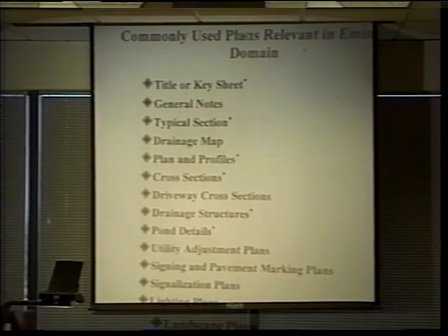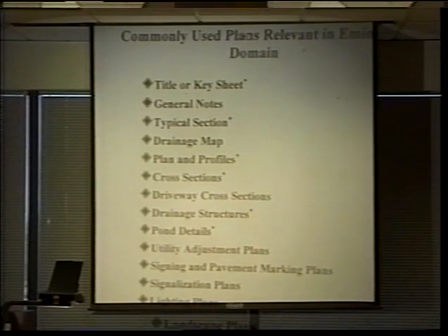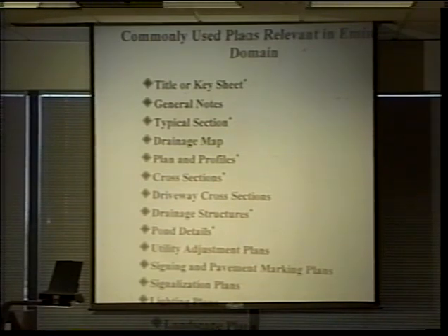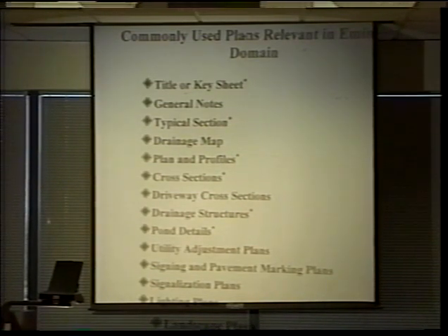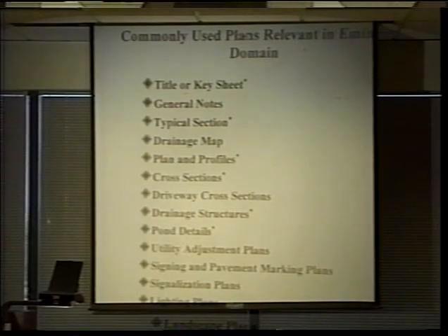The general notes are important. They communicate information from the designer to typically the general contractor or the builder of the project. They have a variety of things, but some important elements on how driveways may be maintained during construction are often contained in the general notes. If it's a commercial establishment, how many hours of the day can a driveway be closed? That could be spelled out in the general notes conditions.